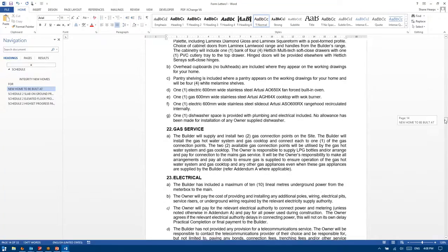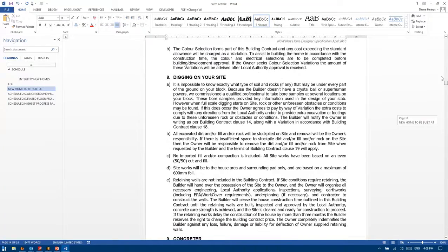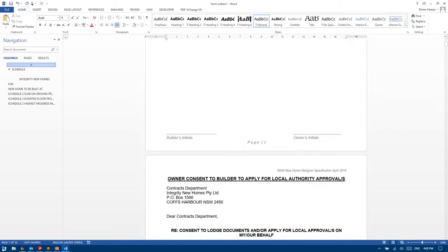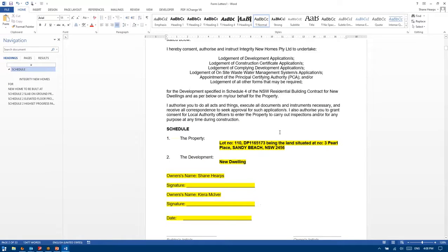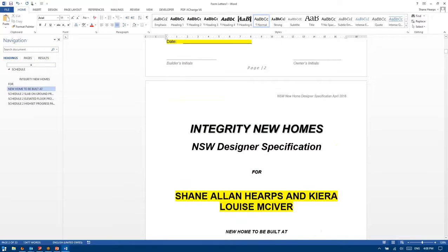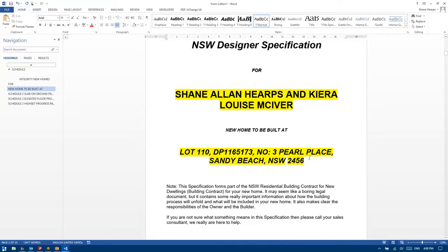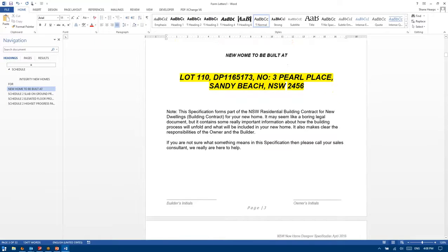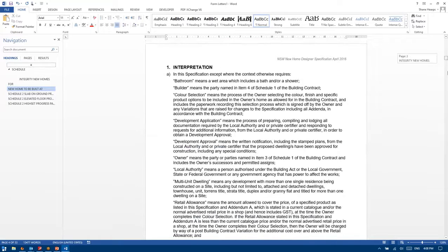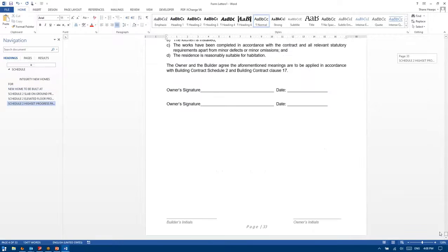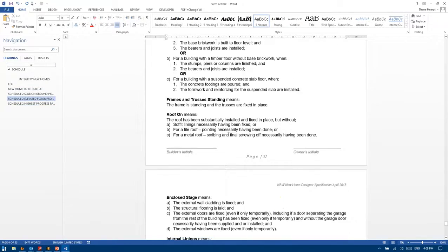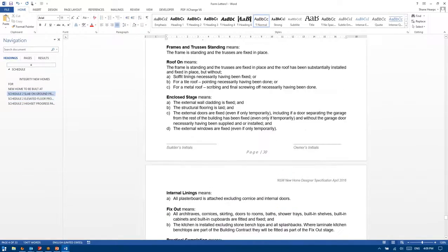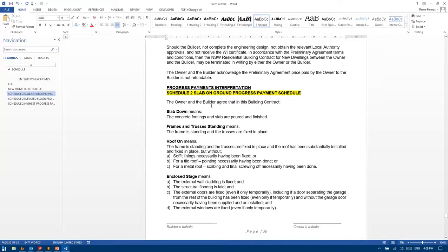It's also useful for those who wish to copy our specification and maintain their own, as they know exactly the fields that need adjusting on a case-by-case basis. And it's worth mentioning with the 3 optional progress payment tables that 2 of them have to be deleted on every occasion, so it acts as a reminder that you don't leave all 3 of them in there, just one will ever apply. Which is why they're specifically highlighted.